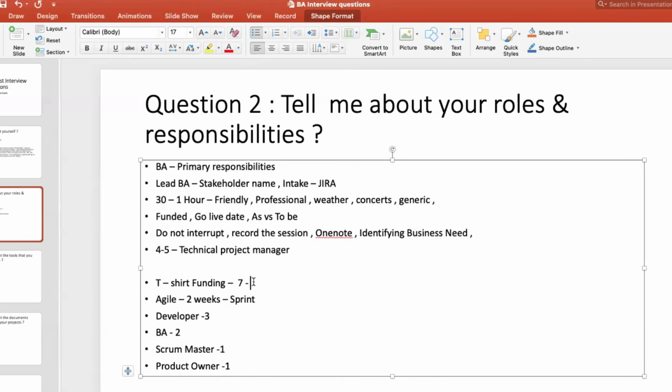And every hour, how much do they need to be charged? You may have a monthly salary, that's not a problem here. Usually project managers calculate billing as per hour rate times number of hours.